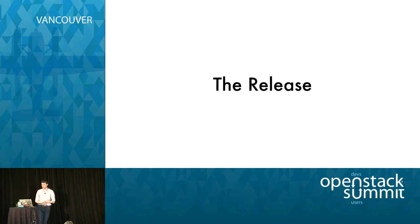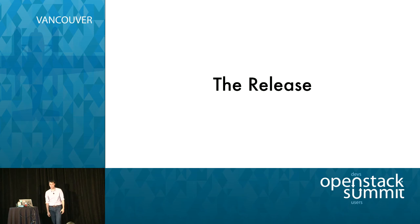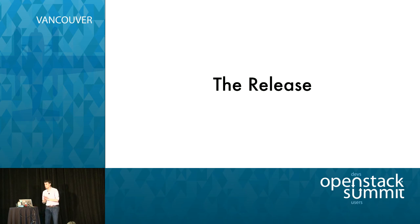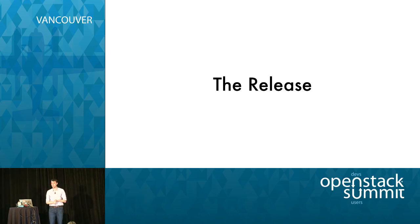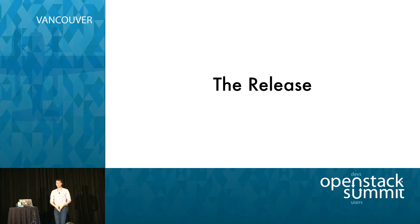Once you do the release, timing it is really hard in an open source project because you can't hide it — it's not secret by definition. The hard part comes when you have all these non-developers involved: marketing people, PR people, press, people writing white papers and filming videos and doing webinars and writing blog posts. You've got to start talking early and often about all of this. I've learned that for a press release, you need at bare minimum a month's notice. So it was kind of fun to say, 'I don't know if we're actually going to be done in a month' — you just update them weekly on where you are.